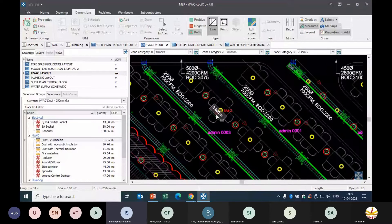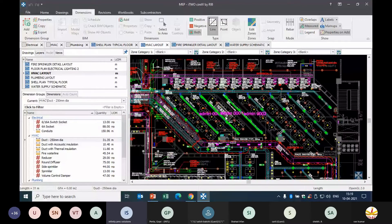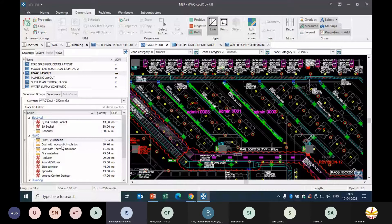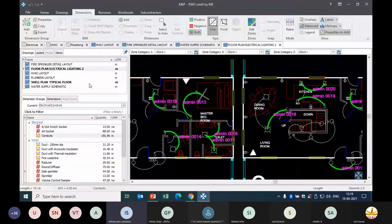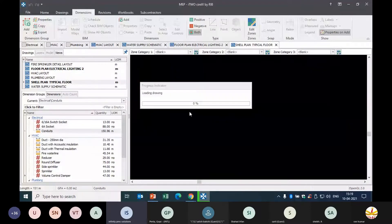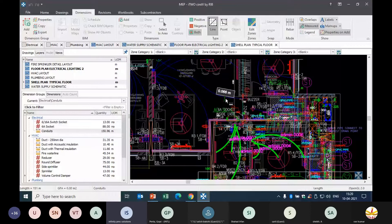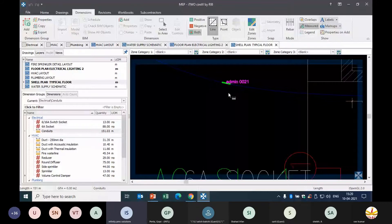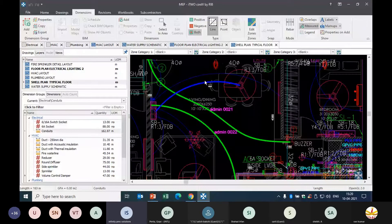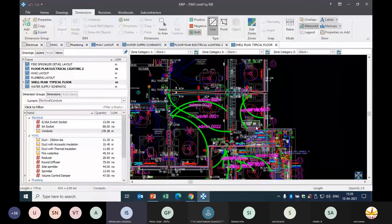Using the on-screen takeoff method for electrical drawings — for conduit measurements or wire quantity takeoff — you can clearly see which conduits have been measured and which are left out. This is the advantage of using an estimation tool with on-screen takeoff. You can use shortcuts to measure entire stretches of conduits. This applies to conduits, ducts, wires, and any elements measured lengthwise.